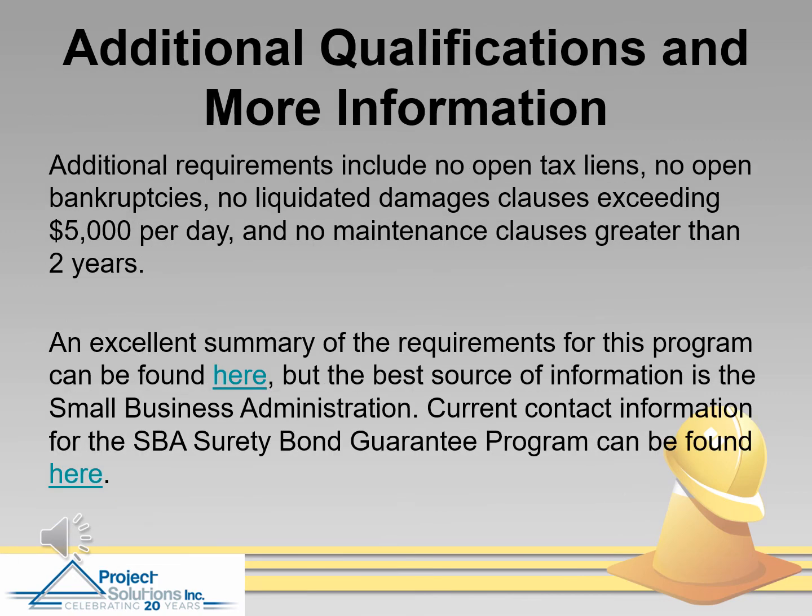And there are some additional qualifications that are just too numerous to list in this brief presentation, but some include: the firm must have no open tax liens, no open bankruptcies. The contract in question must not have a liquidated damages clause exceeding $5,000 per day, and the contract must have no maintenance clauses greater than 2 years.